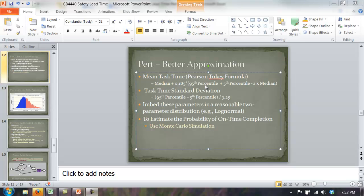We're no longer going to treat the optimistic and pessimistic as the minimum and the maximum. We're going to treat the pessimistic as the 95th percentile — meaning there's about a 5% chance that the time will actually be longer than that. And when we ask for an optimistic estimate, we assume there's about a 5% chance that the task will actually be shorter. This comes from experiments showing people are not particularly good at estimating tail probabilities and extreme values, so we treat those as slightly less than the maximum and slightly greater than the minimum.